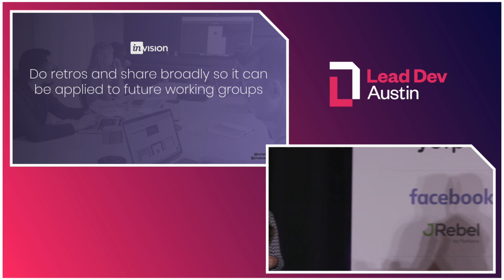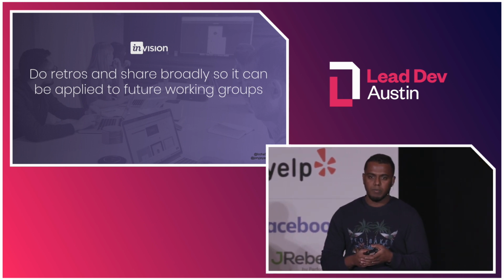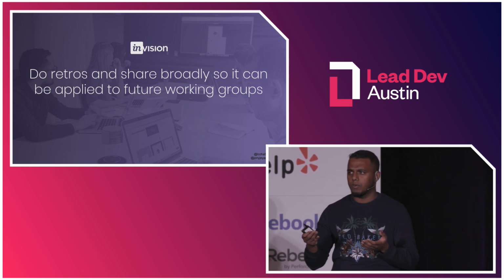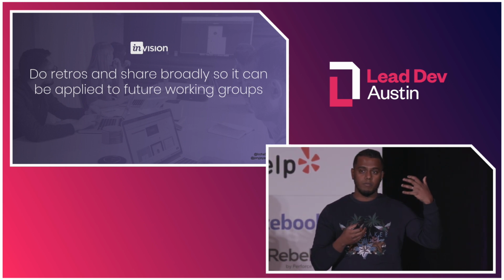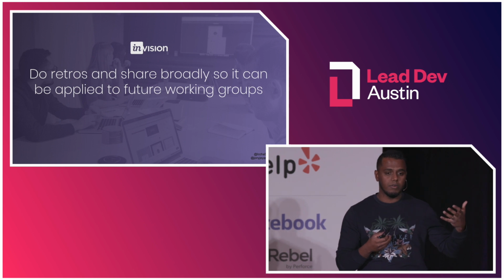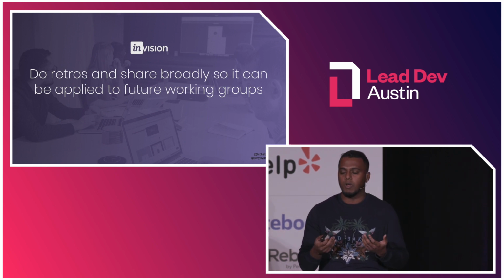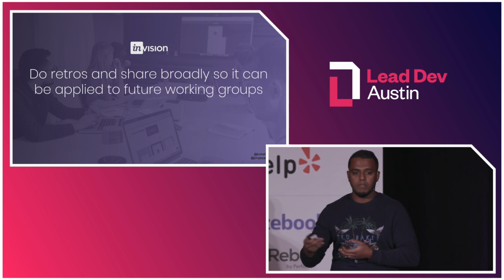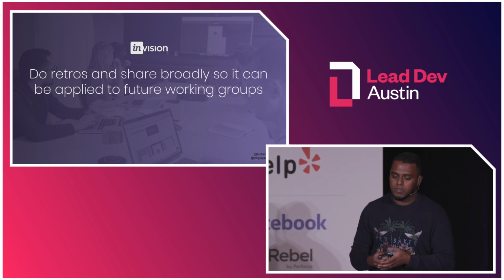So one of the things I think we actually did well with the working group is how we did retros. These were independent groups that ran. We had 4 groups. When the first group finished and they ran a retro on the things that went well and things that didn't go well, we took those learnings and applied them to the subsequent working groups, even though they were led by different folks.